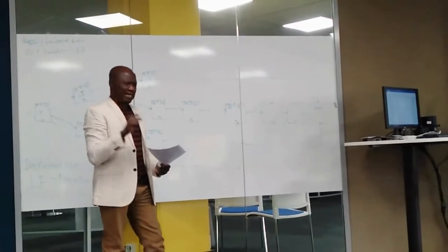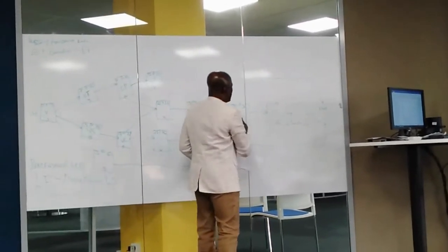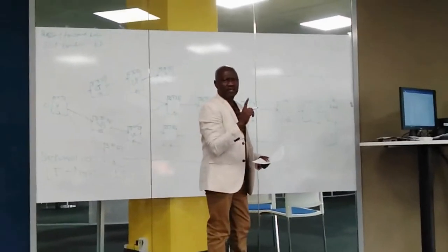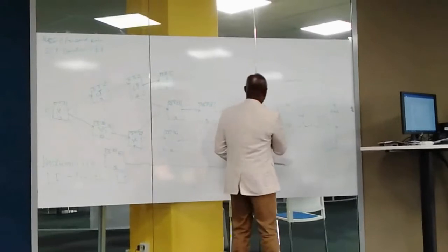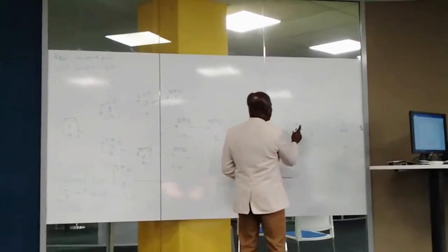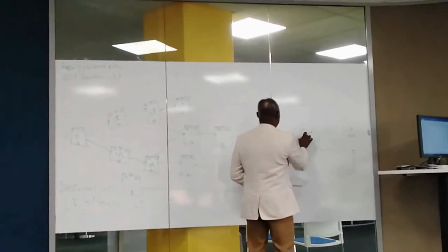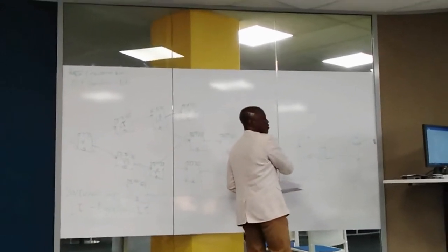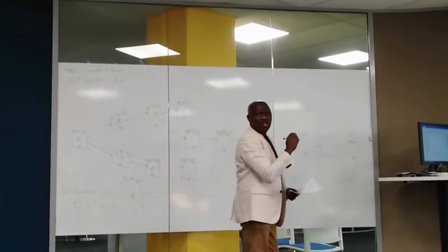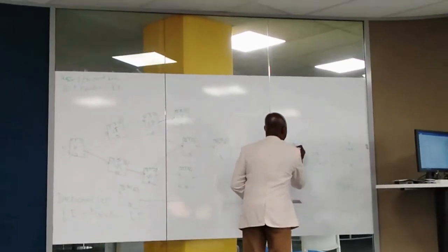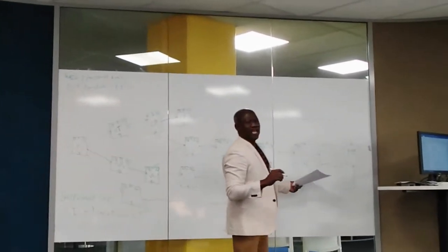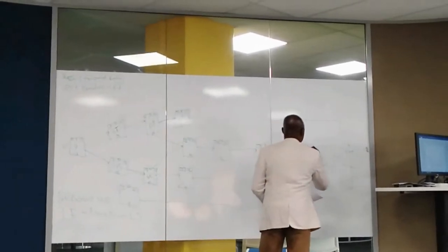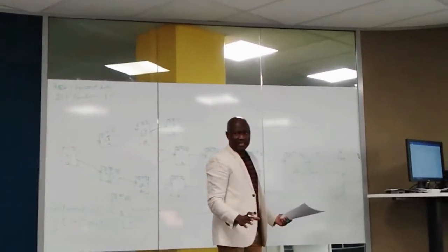Now, 31 days, we are going to activity 12. Activity 12 has 15 days. Activity 12 can only be started when activity 11 is completed. And activity 11 will be completed on 31 days. So we carry the 31 days here, and we add 15 days of this, making 46. Isn't it? Yeah.